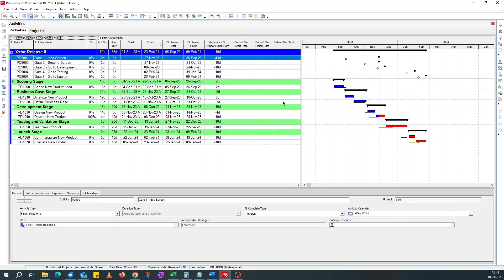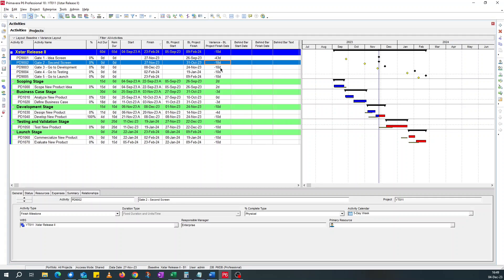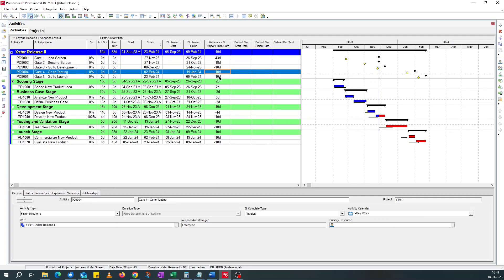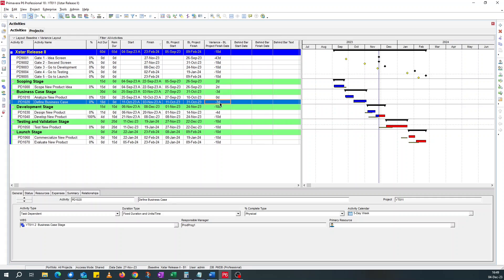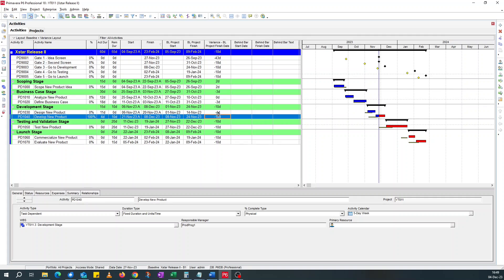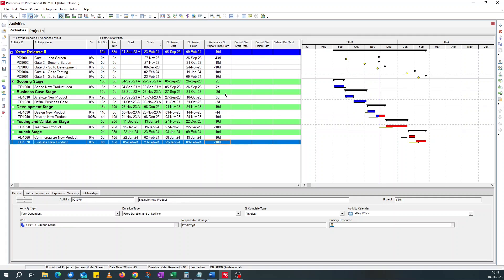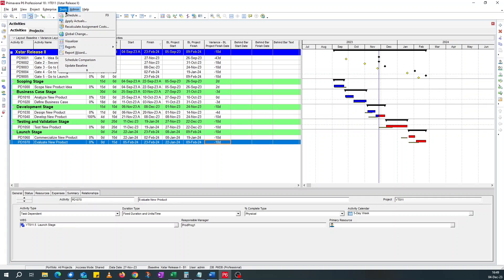Now, these fields are empty because they are, since they are user defined, you need to find a way to add a text to it. To do that, we need global change. In P6 activities that are behind schedule, you have the finish date variance is less than zero. It shows that it's behind. Like these milestones are behind. This is behind. These two activities are behind. And all these are behind.